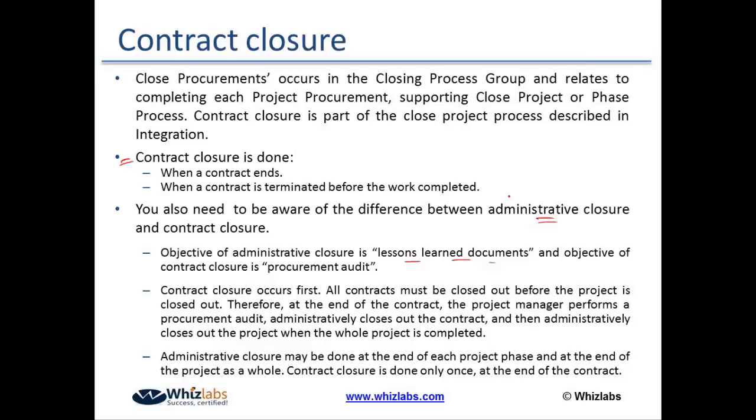And then, yes, if the deliverables are accepted and the project is scope-wise over, as per the release criteria for the resources, we can release the resources, but we cannot consider the project as contractually closed till the time the payment is not made. Hope that makes sense, yeah?